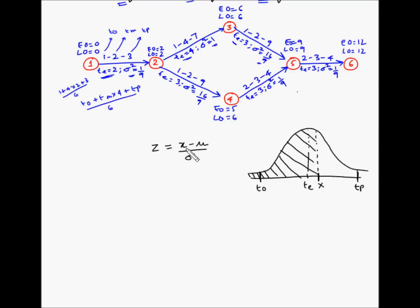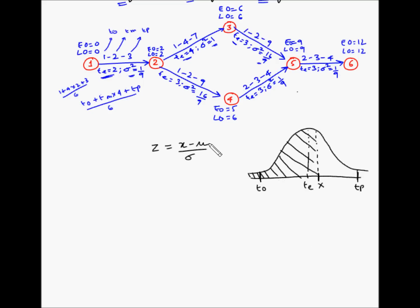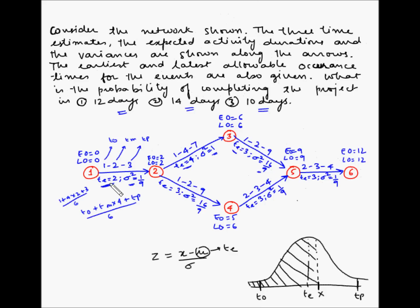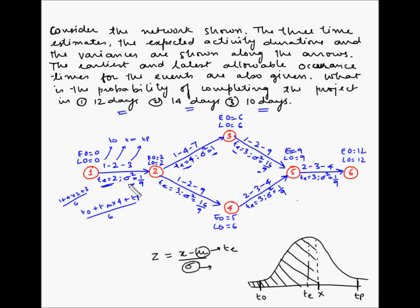We have been given the values of x: 12 days, 14 days, and 10 days. We do not have mu, which is the expected duration of the entire project — we only have expected durations of individual activities. We also do not have the standard deviation of the entire project — we only have the variances for each individual activity. As long as we can find the expected project duration and the project standard deviation, we can find the area proportions and thus the probabilities.